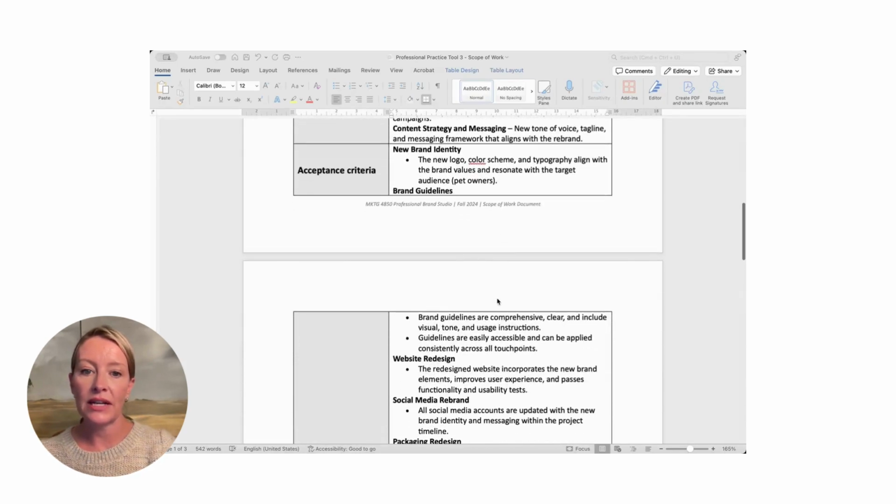The next one down is your acceptance criteria. Under acceptance criteria, you want to think really carefully around what would be acceptable. That doesn't mean you're going to shine them on with descriptions of how great it's going to be. You just want to describe what is an acceptable version of done. If you don't set this with your client, what happens is the client says, I just don't think we're done yet because I actually would like you to do this and this and this in addition. Or I just need to make a couple more changes, or I've changed my mind about how I feel about it, or I've changed my mind about when it's due.